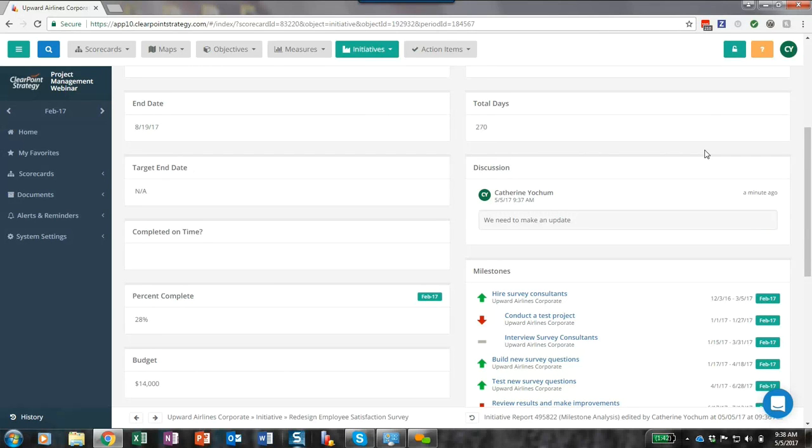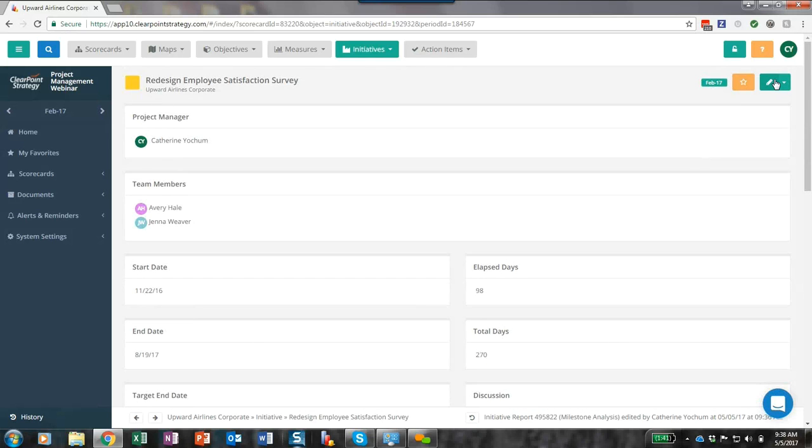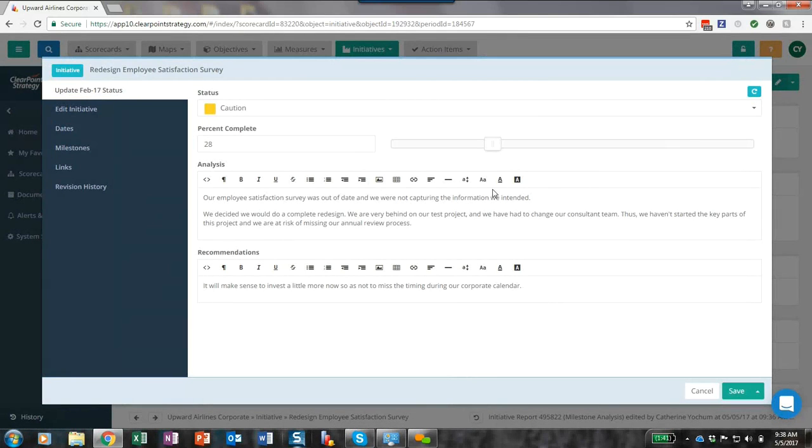So Jenna, do you think that our project team is going to have new information for this initiative every month? Nope, we're really only looking to update the status of this project once a quarter. Okay, so there are definitely instances where you might not want to track new information about your initiatives every month, or you might not even have that information available at that frequency, and that's no problem in ClearPoint. So you can set the reporting frequency of your initiatives just like you can for other elements.